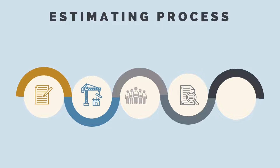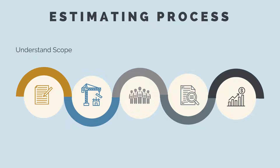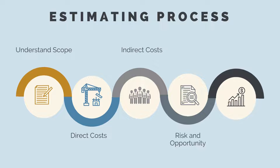At a high level, to produce a cost estimate, we first need to understand the project scope. We need to look at the drawings and specifications to understand specifically what we are being asked to price. Next, we'll calculate our direct costs — these are the costs to complete the physical construction works. Most work in a cost estimate is in calculating the direct costs. Then we calculate our indirect costs. We always calculate our direct costs first because these will influence our indirect costs, and our direct costs will be impacted by our understanding of the project scope. Next, we work out our contingency and finally add on our profit margin.